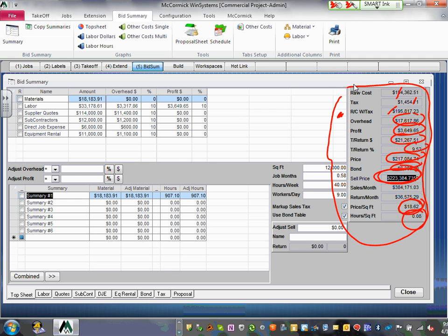Are you kidding me? We haven't done labor yet, right? So you can see that all this dollar is coming out of quoted material. We haven't assigned any labor yet. These are the flags that come every time you guys are doing the software. When you finish your project and you give it to your boss, Derek, these are the ones they're going to be looking at. Oh my God, he has 2 hours per square foot for this type of building, and every time we do that, we have 10. You must have screwed up something somewhere, or explain to us why you are 1/10 or half of what we should be. Am I making sense, gentlemen?